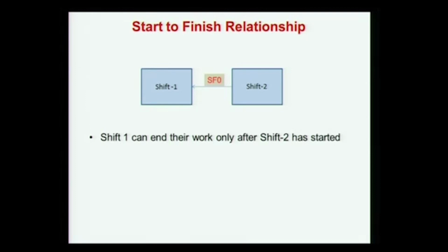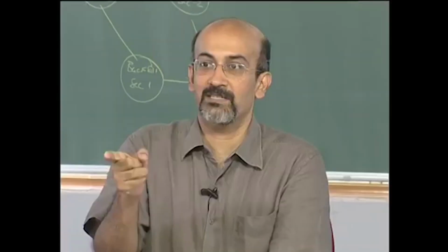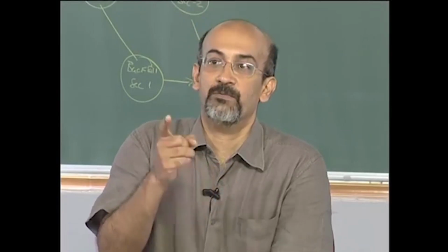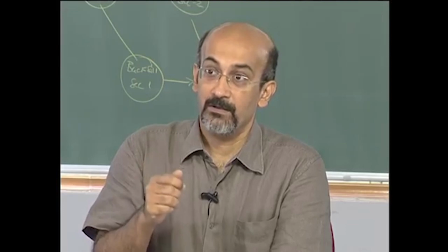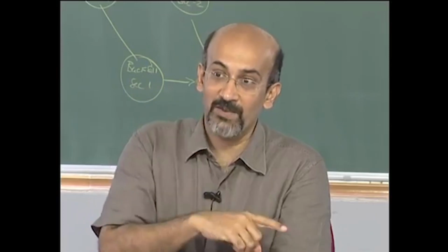Let's say you have 2 shifts. I want to represent that shift 2 will start before shift 1 ends. Is that the way I am trying to represent this? No, what am I trying to represent? It is not that shift 2 can start when shift 1 has ended; it is that shift 1 can end only after shift 2 starts. That is, the people on shift 1 can leave only after shift 2 people have come.